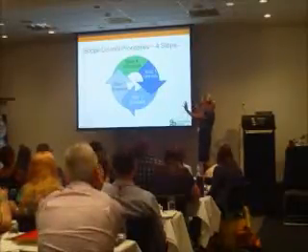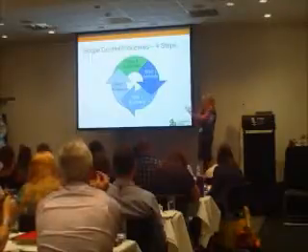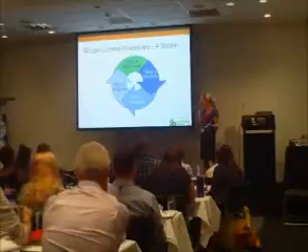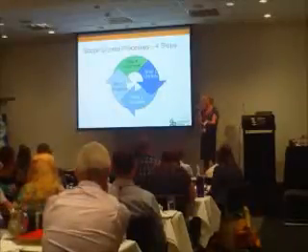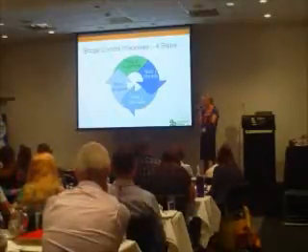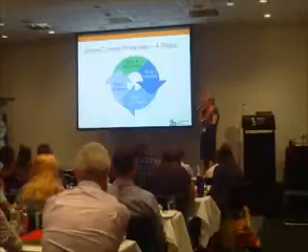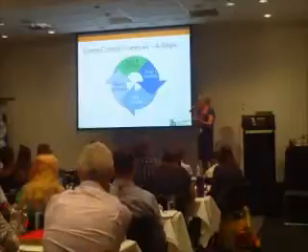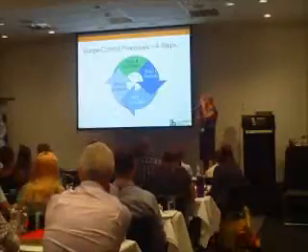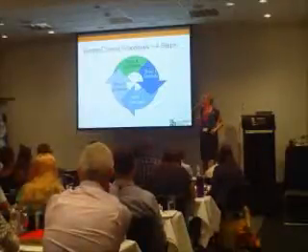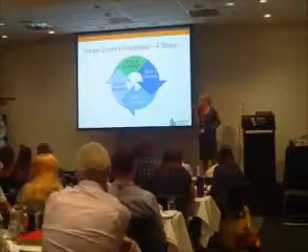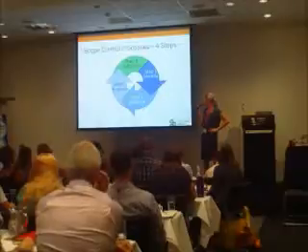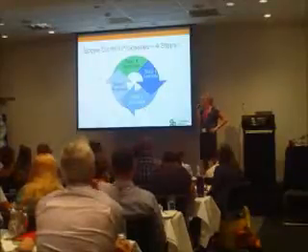So you identify it, then you evaluate it. What is it going to cost us? What do we have to change? Who's going to be involved in that and so on? You propose the alternative plan, or this is your variation request. Put that paperwork in place and you get it authorised to continue. And your client says, goodness me, I'm not spending an extra $70,000 on that. Let's just forget about it for now. Or your client says, yeah, absolutely, let's continue.